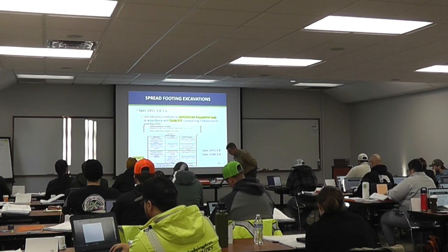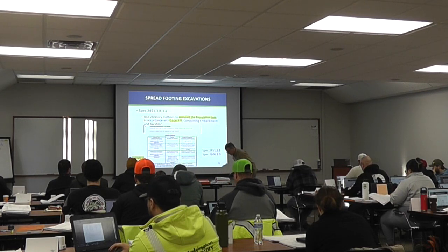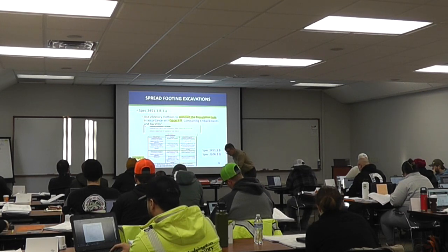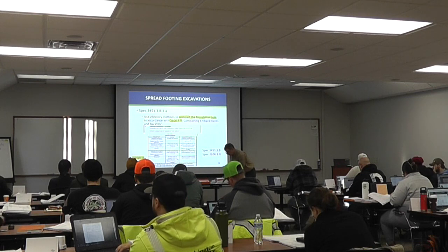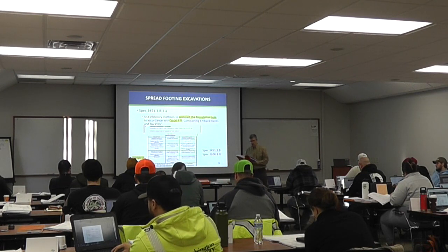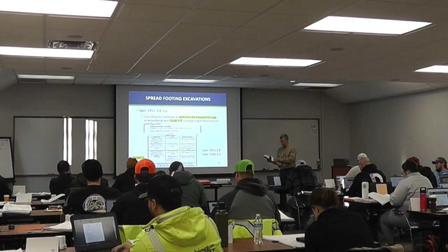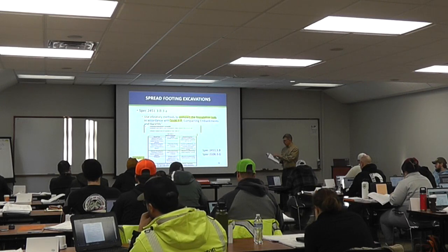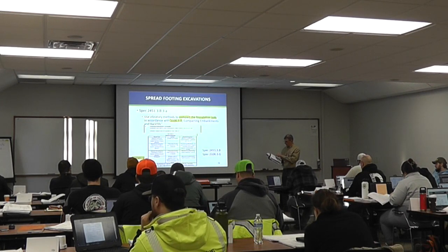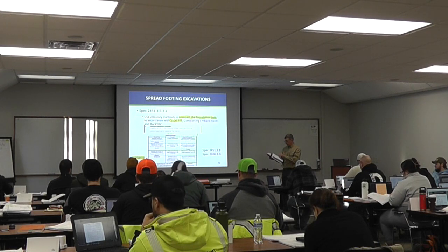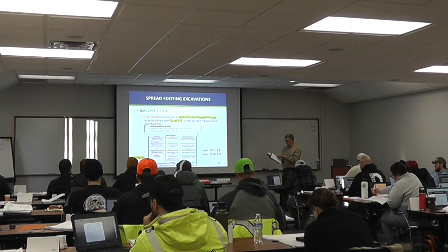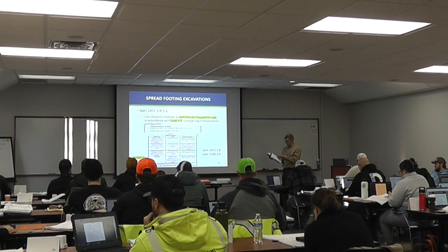Table 2106.3-4. And there's a couple of different things, material, such and such, and then location. And so the location, the center column there, all depths and locations, greater than 3 feet, less than 3 feet, and then all depths within an excavated trench and backfilled structures, 2451, structures excavation backfill.